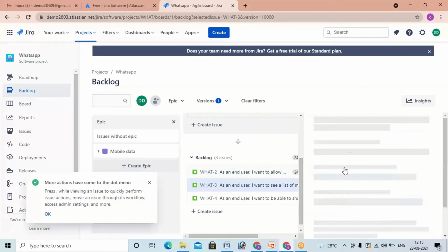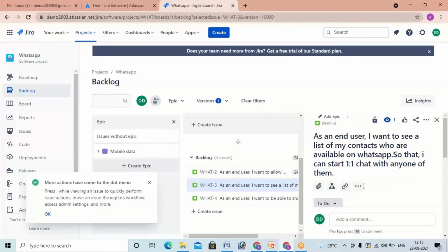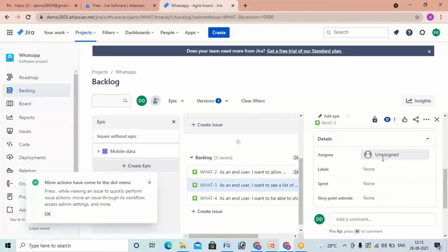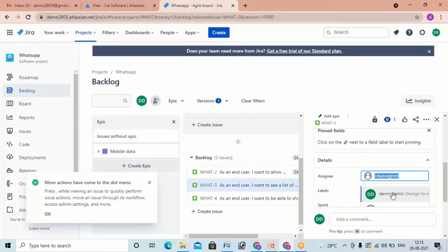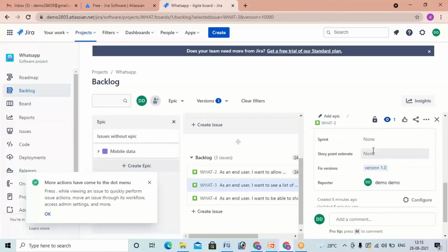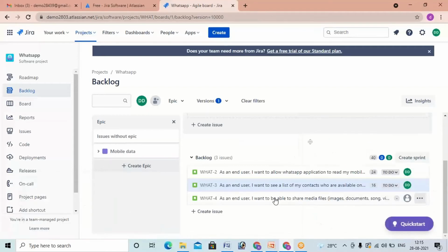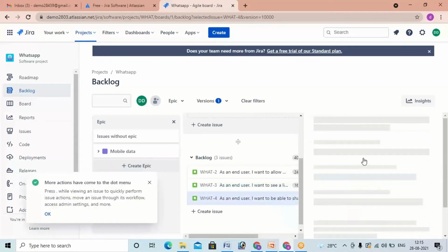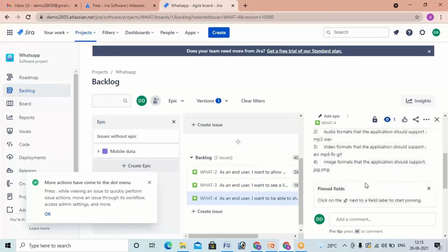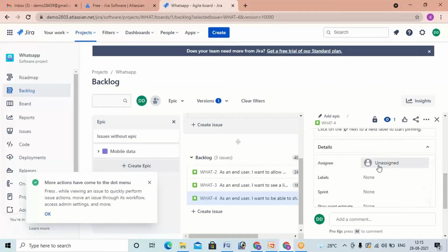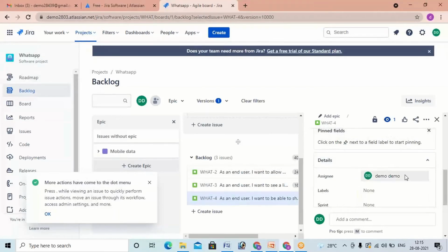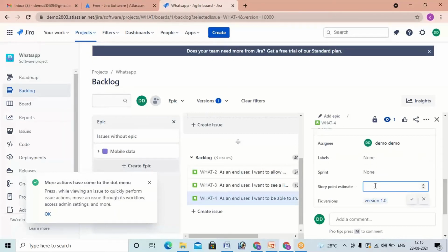The second thing, again you have to repeat it. The Scrum Master comes into the picture, he's going to ask who is going to take care of the second user story and how much time is required. So here I will take 16 hours, and after that close this one. Then again the same step should be repeated for all the user stories. Assign this particular task to the technical team, ask them the timing, how much they require. This sort of thing is going to be done.